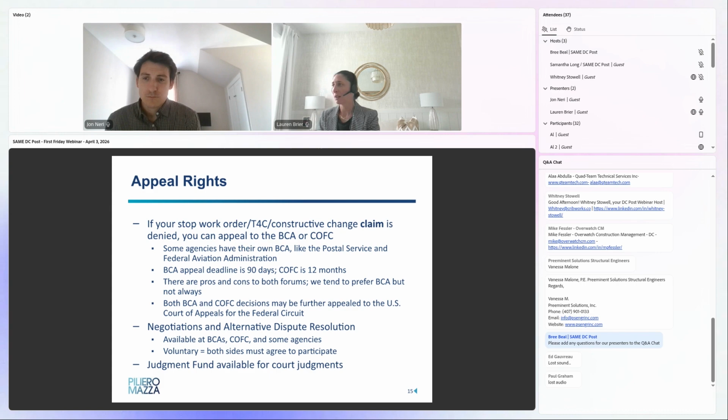Okay, we're going to talk a little bit about appeal rights as well. I know that we're a little short on time, so I'm going to move a little fast. As far as appeal rights, say you submit a certified claim based off of a stop work order REA converting to a claim, a termination for convenience proposal converting to a claim, a constructive change REA converting to a claim, anything that's converted to a claim that receives a contracting officer's final decision. So again, going back to what we talked about, that 60-day requirement for the contracting officer to issue a decision.